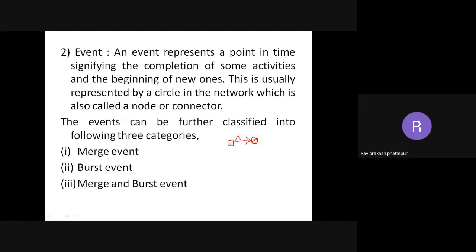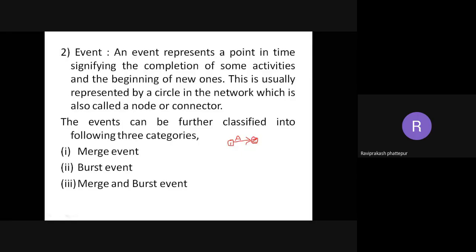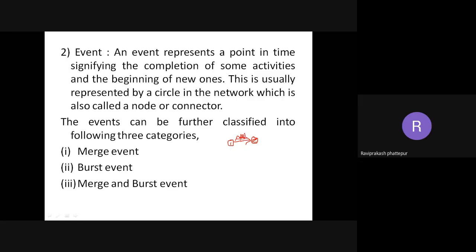So what is this activity? It is A, and I will show you the representation of time. The time required would be written next to this in a bracket, for example 2. It could be 2 hours, 2 days, 2 minutes, whatever. So I will write it like this: A(2), in the sense that the duration of this particular activity A is 2. It will start after 1 and it will end at 2. So this is what they mean.